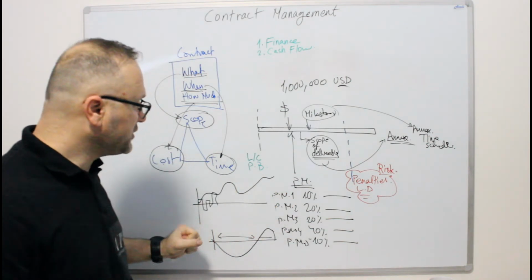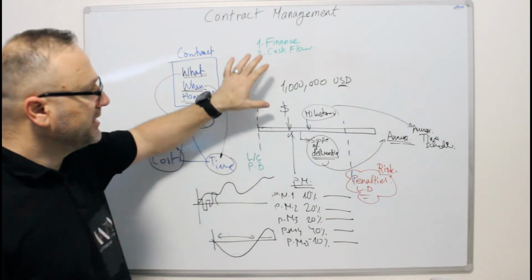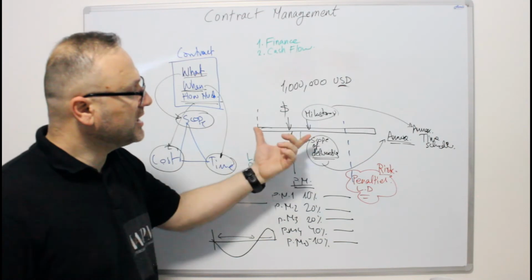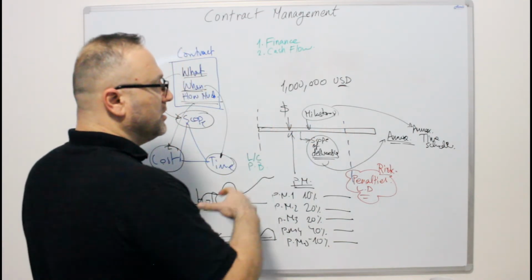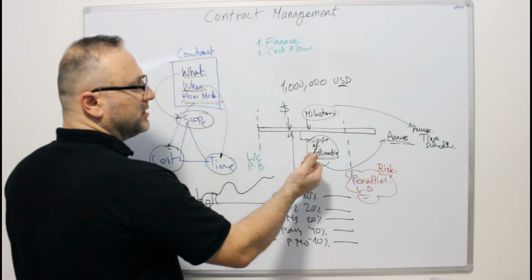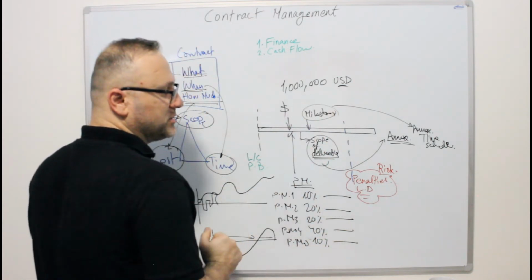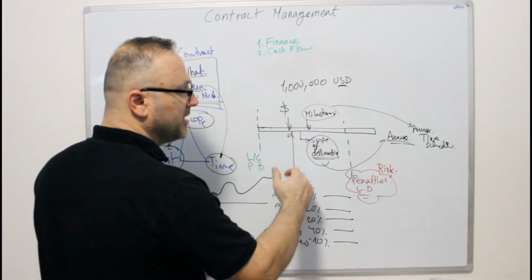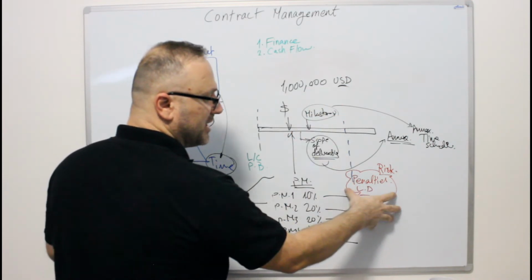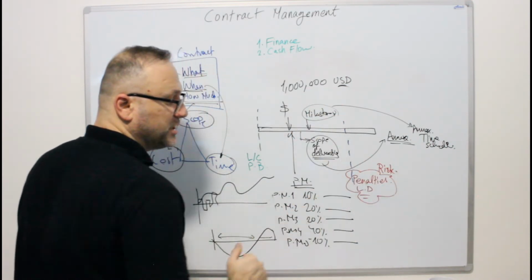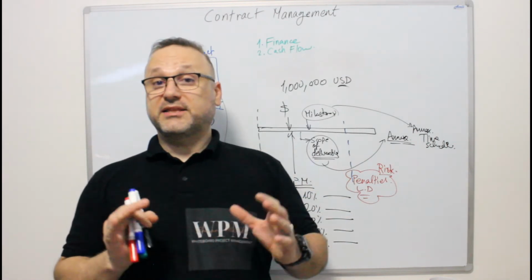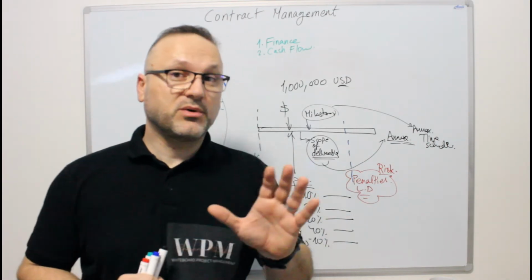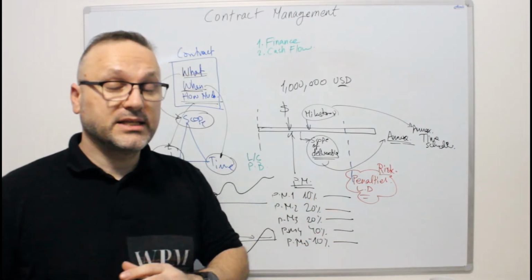Once you prepare the cash flow, now it's time to start monitoring the other things. You need to monitor your milestones with your team. You need to avoid the milestones which are under liquidation damage. For this, it's good to have a simple table, which we call a milestone list.